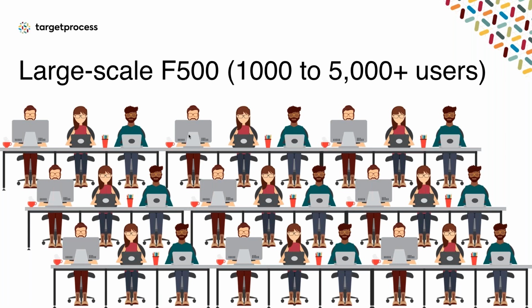It was about 2 or 3 more months after that before they could actually finalize the purchase and put training in place. And they gave themselves about 6 months, maybe even 8, if I recall properly, to get this rolled out to everybody, because there were fairly big projects in place, and there also was a lot of data that had to be transferred between those platforms. So that was one that I felt really good about. The total process, I was only involved for about 6 months of it, but the total process went on another 6 months beyond that, and that was because of the large scale of it.